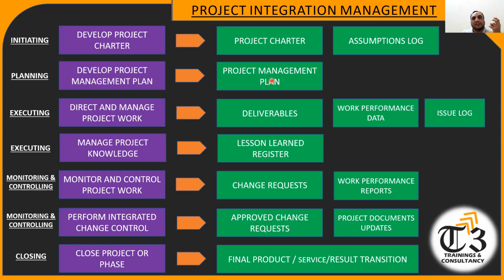So once the 10 management plans, 3 baselines, configuration management system, change management system, and all the project documents are compiled, they will be submitted as a big file called the project management plan, submitted to the sponsor. The sponsor will review with the experts and customer, and once approved, then it will be given to the, we don't give the whole plan to the execution team. Instead, we give them the performance measurement baseline.